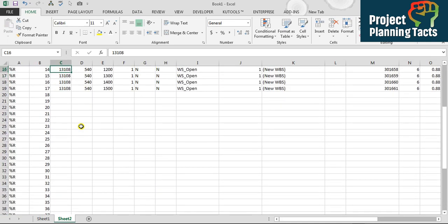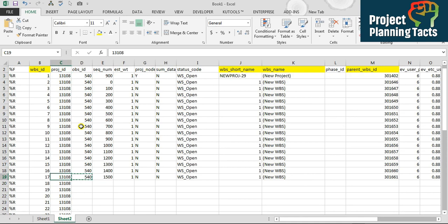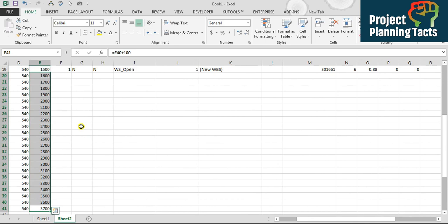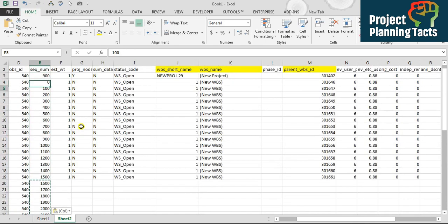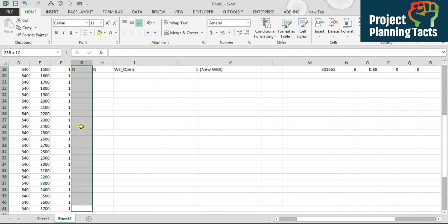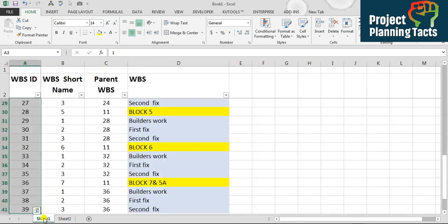The project ID will remain the same, so we keep it as-is. For OBS, since it is the same from top to bottom, we keep it the same. For the sequence number, looking at the pattern — 100, 200 — the increment is 100, so I'll apply a formula adding 100 each time, then copy-paste as values. For the EST column we keep it the same, fill down as-is, and the status code field we also just fill down.